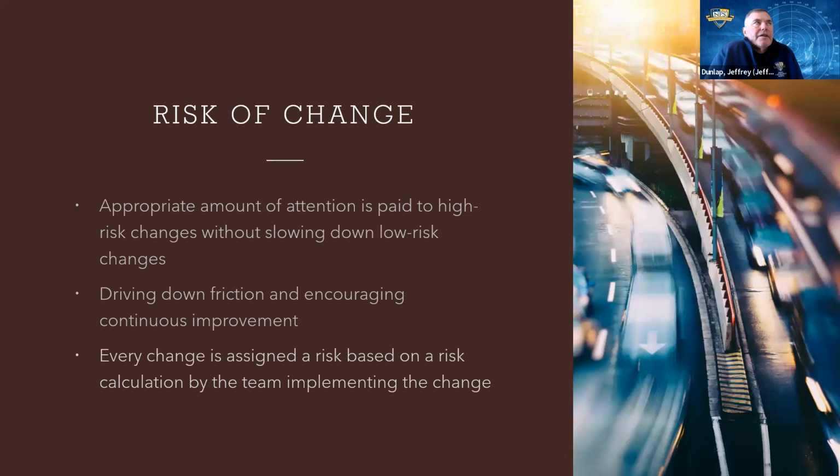So if I'm making a change to software, if I'm adding capability, I need to look at all this stuff and determine what degree of risk I am inducing into the software, and maybe I need to stop if it's a high risk item. If so, let's evaluate this, let's do manual. So we're not saying deliver everything without a person looking at it, or without us looking at it from a team perspective. I'm not saying that, and they're not saying it here.